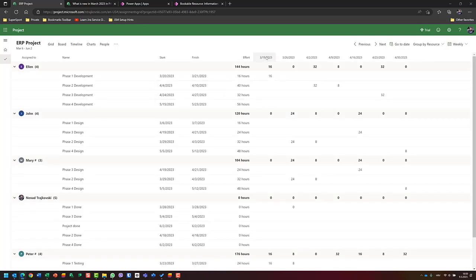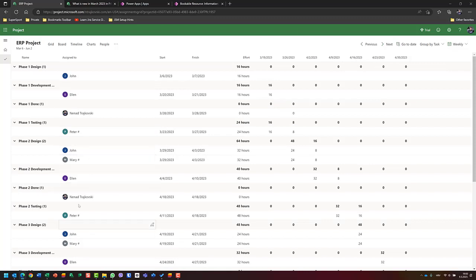In the weekly view, I can see exactly that Alan is going to work on phase one development from the week of 19th March for 16 hours, then on 2nd of April, 32 hours on phase two development. This is essentially the resource usage view. But if I want the task usage view, no problem — I can group by task instead of by resource. For example, on phase one design, only John is going to work. On phase two, there are two resources — John and Mary — and you can see John will work 24 hours and Mary 8 hours that week.